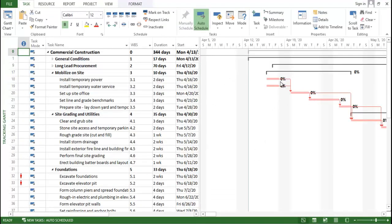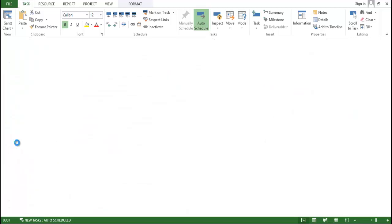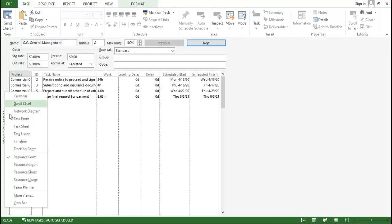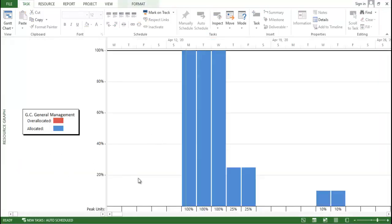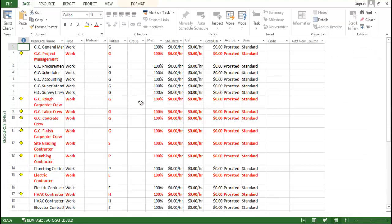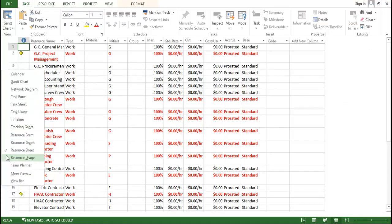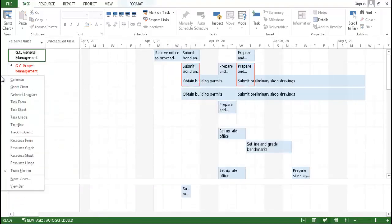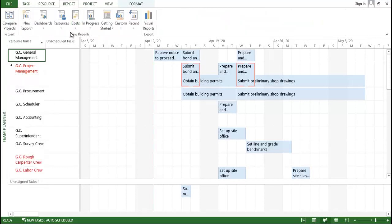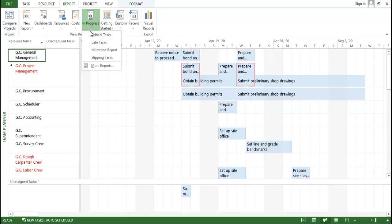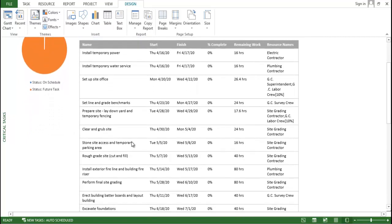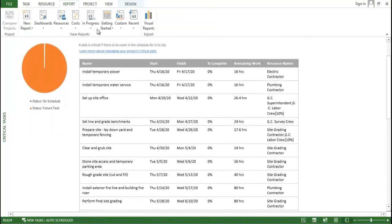There is also the Tracking Gantt view showing percentage completion, the Resource Form showing how many resources are working on each activity, the Resource Graph showing over-allocated versus allocated resources, the Resource Sheet where you can allocate costs, Resource Usage, and the Team Planner showing which person is working on which task. You can also generate reports such as the critical task report.